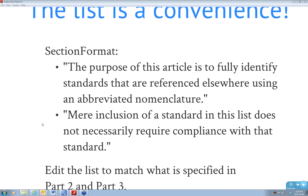Clifford Marvin notes that effective dates are very important, especially when working with the school construction authority in New York City, which revises specifications cyclically and may require compliance with current standards even when revised after the issue date. That's an interesting contractual problem that probably wouldn't stand up in court. Most changes to reference standards are minor and evolutionary, and the construction lawyers I've spoken with don't consider the date of the reference standard to be a significant issue.